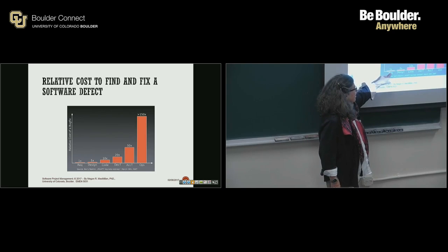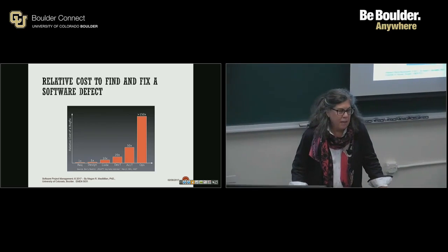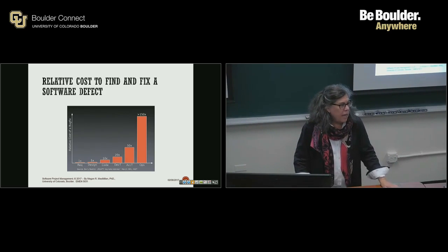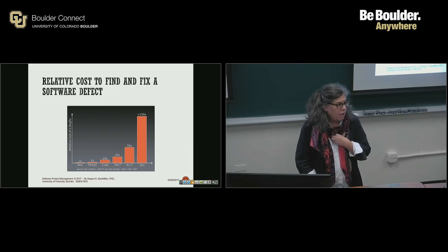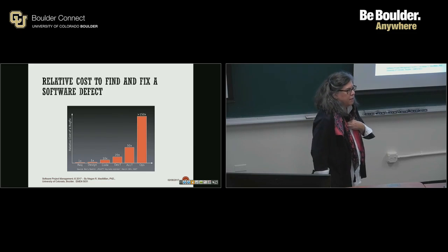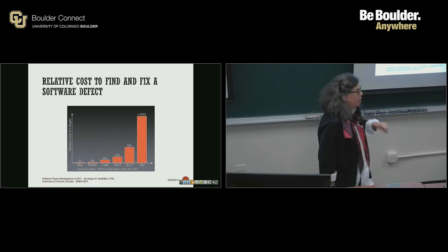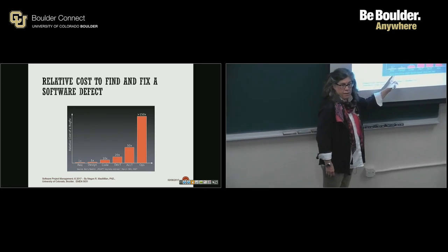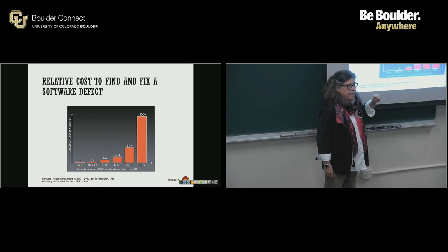And if you find your error when you're doing requirements, if I sit down and you say to me, I want something that does this, and I go, okay, I hear you that you want this, is that right? If I got it wrong, how hard is that to fix? At that point, not very, because you say, no, you misunderstood me. What I said was this, right? So if I can fix it in requirements, it's not a problem. Fix it in design, that's 5 times the problem of fixing it in requirements.